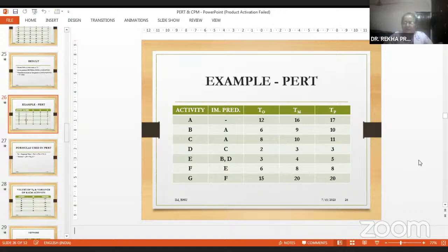The first thing will be to make the plinth level, up till plinth level. Then you build up the walls. Once the walls are being built, you can either fix the doors and windows at that time, or maybe once you have finished the roofing, you just leave the space for the doors and windows, and they can be fixed later on.